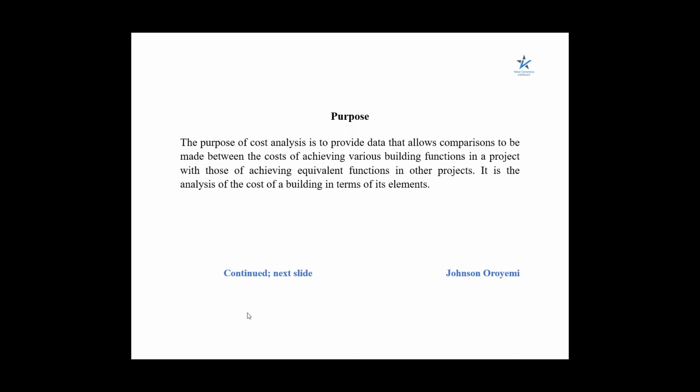Now, when we talk about the purpose of cost analysis, without cost analysis we wouldn't have a basis for carrying out cost planning for a new project. So the purpose of cost analysis is to provide data that allow comparison to be made between the cost of achieving various building functions in a project with those of achieving equivalent functions in other projects.